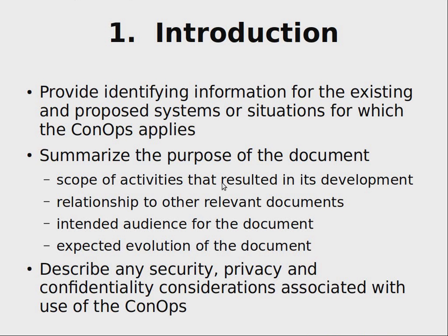And in this introduction, what is very important is that you provide identifying information for existing and proposed systems and situations, because in any non-trivial project, talk may be about different parts of businesses, different parts of organizations, etc., etc. So that means scope, or how large an area of business owner's activities you are analyzing and investigating, is a very important part, because for large organizations it definitely will happen that you will not analyze everything, you will analyze only some part of everything that this business owner or your customer, if you are doing this analysis as a contractor, is doing.